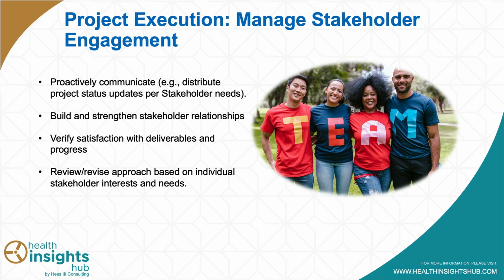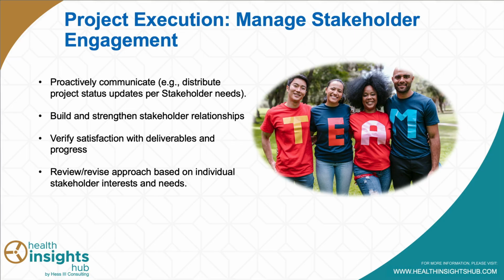Another component, and the final component we're going to discuss today in project execution, is managing that stakeholder engagement. In the project initiation phase, we identified who those stakeholders were. In the project planning phase, we did an analysis to figure out what their level of interest is, what their level of power is, all those things, so we could really identify who we need to pay attention to. We mapped them out and assigned individuals to take the lead engaging those individuals, and now it's time to do that work.